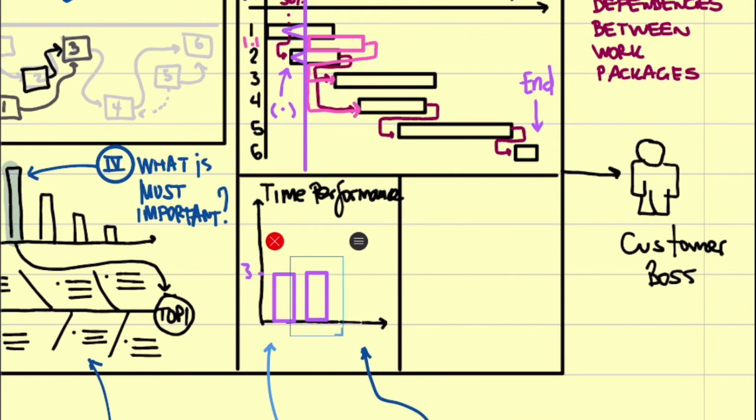Then we have a delay on next of 4 weeks. Usually delays increase unless you pay more money to your people to work on Sundays or to work on whatever, extra time, and then you fight back on time.